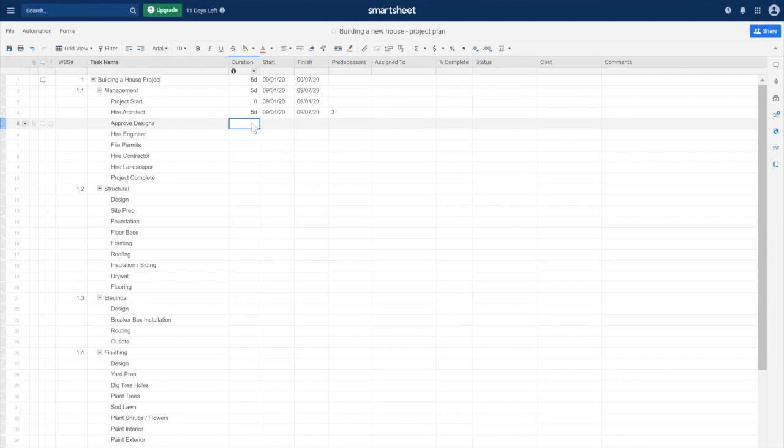For approving designs, that is simply a milestone. We just want to know that when those are approved, we can go ahead and move forward. So 0 days duration. However, there are predecessors. We want to enter hiring an architect as a predecessor. There we go. It populates the date for us.